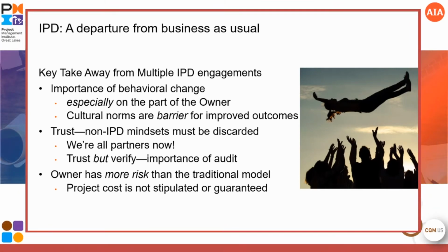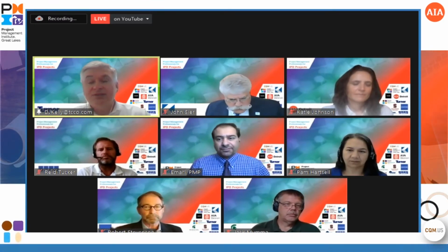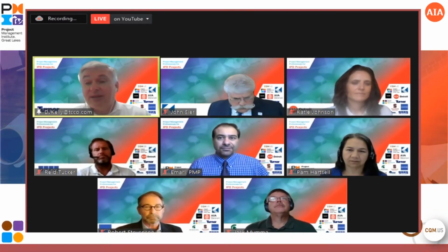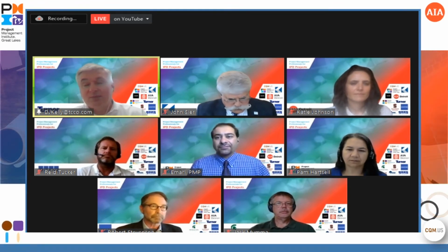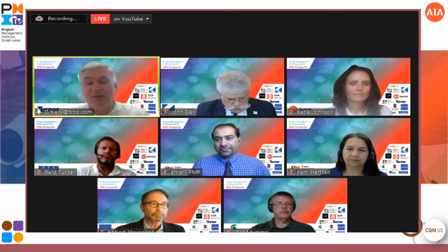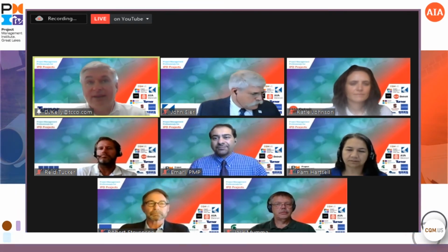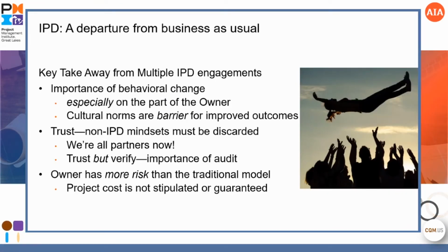Everybody who's in the IPD, and it's not all the partners, but it's generally 60 to 70% of the participants, are in the IPD and sharing their profit. They are partners now. Everybody at the table is a partner. And what comes with that is there needs to be a tremendous amount of trust that everyone's working towards the same goals. Many of the IPD projects that we've signed also have a robust audit program to verify what is cost, what's overhead, what's profit, and make sure that all the dollars are kept within the same bucket, using the audit as a means to build trust among the team members.